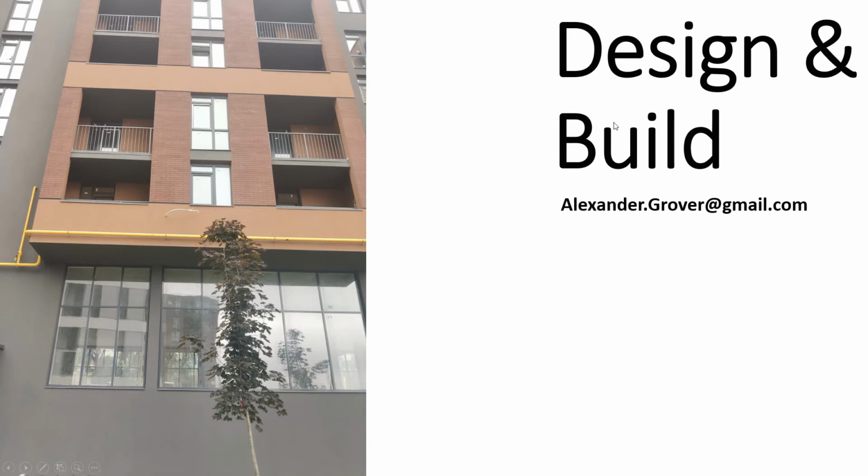And as you can see, I can help you with design and build, and offer consulting and project management. You really have to have good project management when you do something like this. Break everything down into digestible bits, where there's a definite start and stop, so if there's a pause, you're not having to do rework or tear something out and start over. This project plan is designed that way, to be done in small pieces when the time or money is available. That's the way you have to approach this, especially in Ukraine during this era.